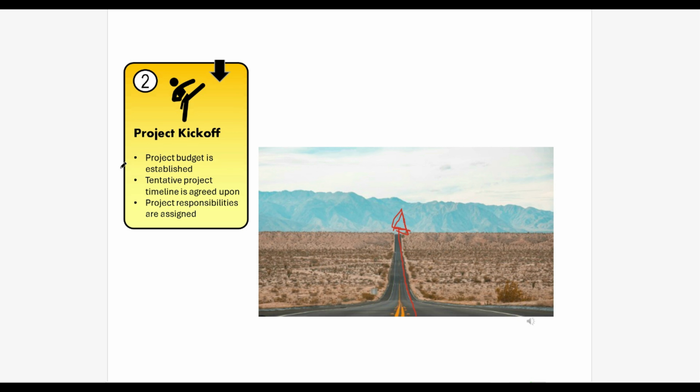Project kickoff, I guess you could consider this as an initial consulting where a client will come to Bevel Edge and say, hey, I have XYZ product. Of course, we'll hear them out for an entire hour, completely for free, no strings attached. We put together a project budget, tentative project timelines, and some of the project responsibilities are reiterated to the client, as in what they need to do to make this project successful and what we will do as part of our responsibility to help move the project forward.